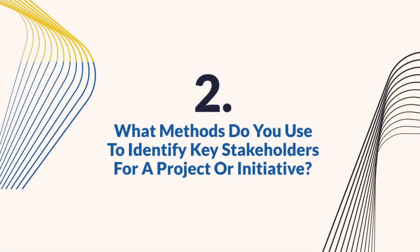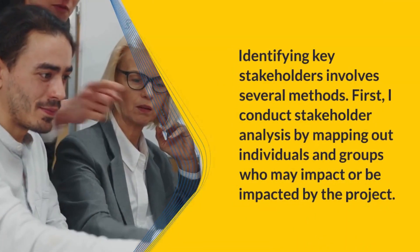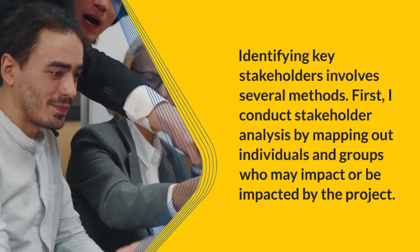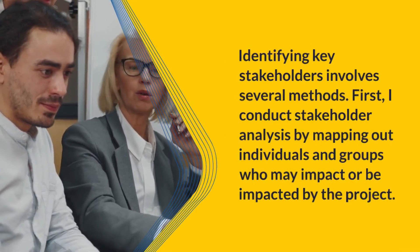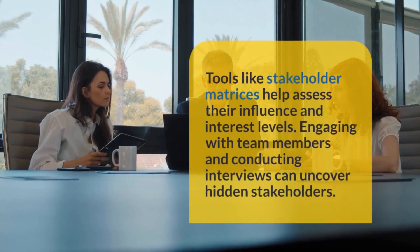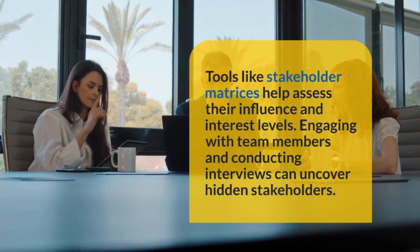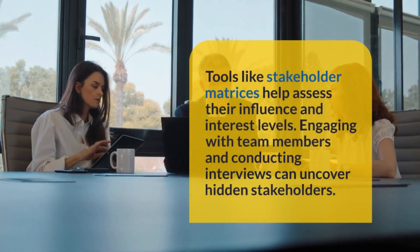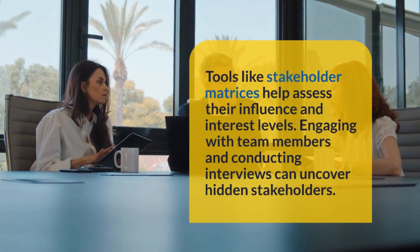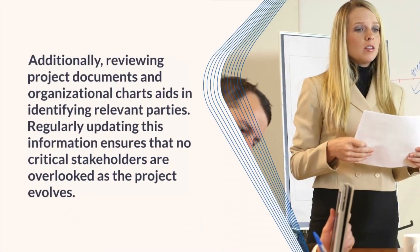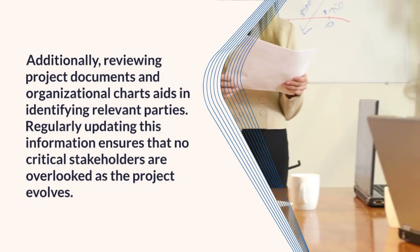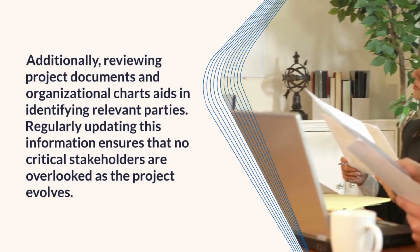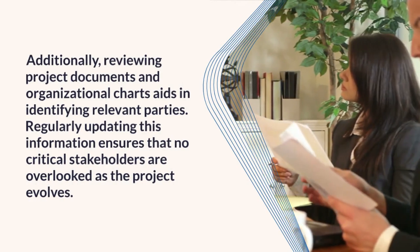Question 2: What methods do you use to identify key stakeholders for a project or initiative? Identifying key stakeholders involves several methods. First, I conduct stakeholder analysis by mapping out individuals and groups who may impact or be impacted by the project. Tools like stakeholder matrices help assess their influence and interest levels. Engaging with team members and conducting interviews can uncover hidden stakeholders. Additionally, reviewing project documents and organizational charts aids in identifying relevant parties. Regularly updating this information ensures that no critical stakeholders are overlooked as the project evolves.